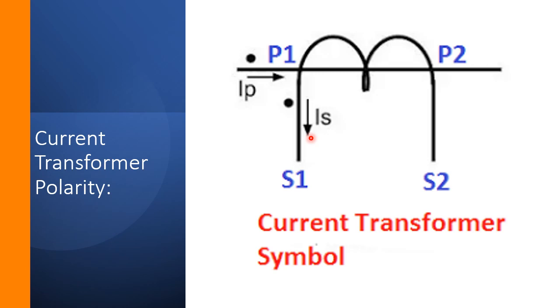P1 and P2 are marked on primary side. If you see a CT during commissioning or a nameplate, you will see that P1 and P2 are marked. The placement of CT is marked as per drawing. If CT is installed in a differential protection scheme, distance protection, or directional overcurrent protection, where direction of current is important, you should check the polarity 100% and make sure that the polarity is correct.